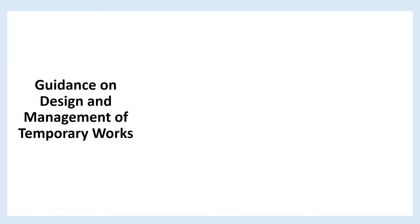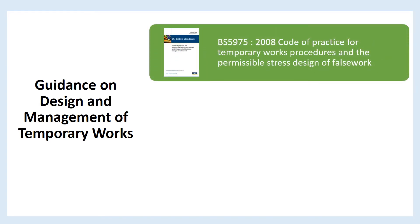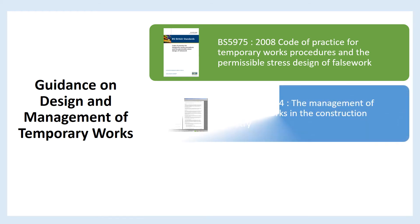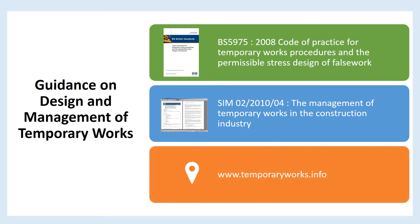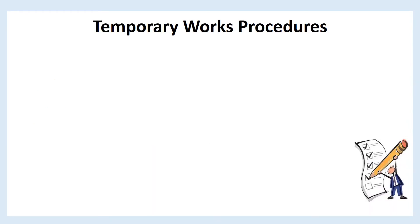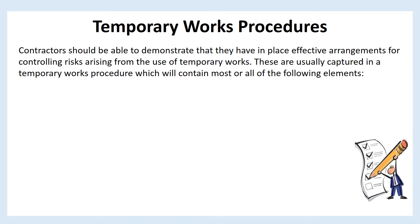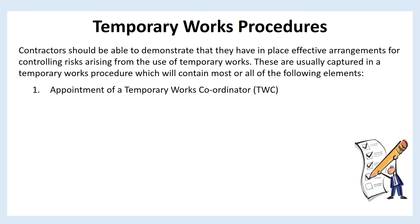Guidance on design and management of temporary works includes: 1. BS 5975:2008, Code of Practice for Temporary Works Procedures and the Permissible Stress Design of Falsework. 2. SIM02-2010-04, The Management of Temporary Works in the Construction Industry. 3. www.temporaryworks.info. Temporary Works Procedures: Contractors should be able to demonstrate that they have in place effective arrangements for controlling risks arising from the use of temporary works. These are usually captured in a Temporary Works Procedure, which will contain most or all of the following elements: 1. Appointment of a Temporary Works Coordinator (TWC).